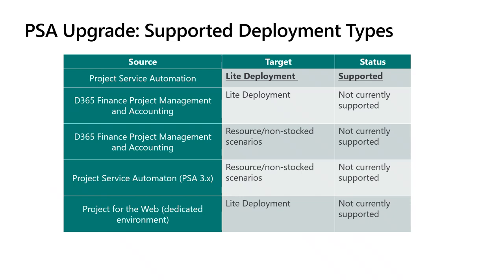And finally, although the Project Operations model-driven app wraps Project for the Web as the scheduling engine, the two types of projects, one for Project Operations and one for Project for the Web, don't actually mix. You can't edit a Project for the Web project with Project Operations or vice versa. They have a project type, and if you need to edit a Project for the Web project, you do it in Project for the Web.